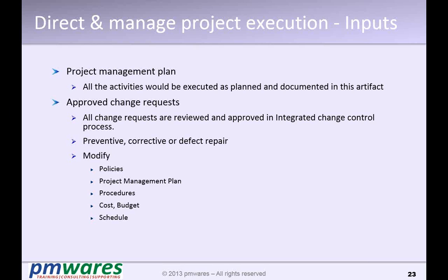In general understanding, defect repair is not considered a change request. So please remember that as per PMI, any change in the existing plan, even the defect repair, is also a change request. So if you find a defect in your testing, you issue a change request as per PMI, which is normally not understood in the project. Now, the common understanding is that defect repair is not a change. What the customer is talking about out of the scope, or we are suggesting something out of the scope, is only a change request. But here all preventive measures, all corrective measures, and defect repairs are all change requests.